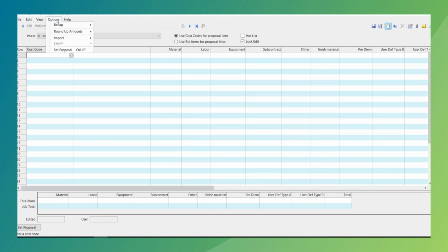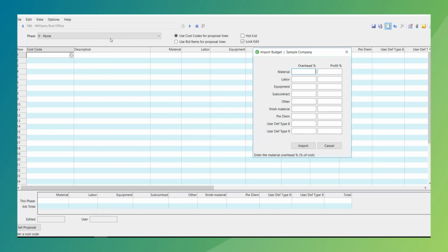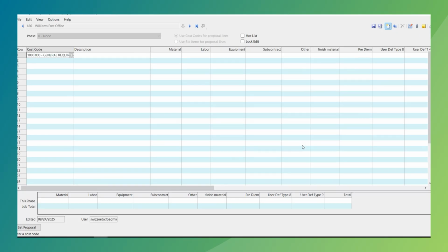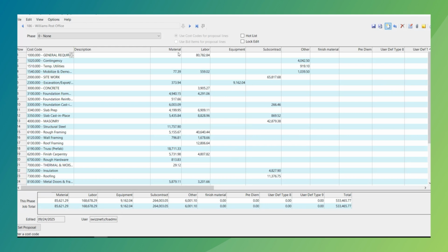So if I want to bring in a proposal, which is our contract amount, a lot of times we can bring that in. It's our budget plus profit and overhead, like I said, but nobody wants to sit down and 10 key that information all over again, or they don't want to import it. So when we bring in the proposal, AKA the contract amount, we bring in the budget and then we can put in our percentage of what we want it to be. So if I want to make 10% overhead and say a 5% profit, then I just simply import and the system's going to take care and do all the math for us on the back end. So allowing us to bring that proposal, AKA contract, based on the budget, and nobody has to sit down and 10 key that information all over again.